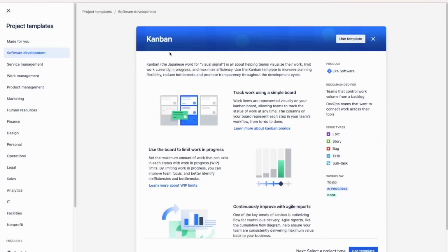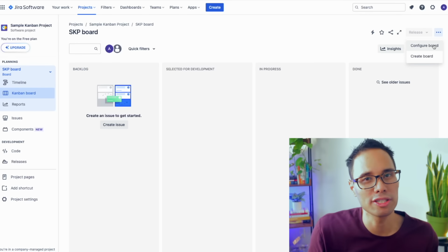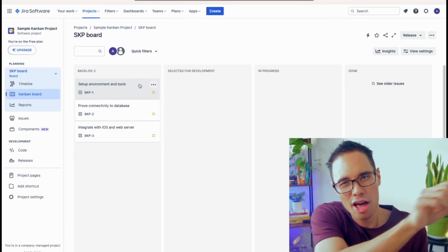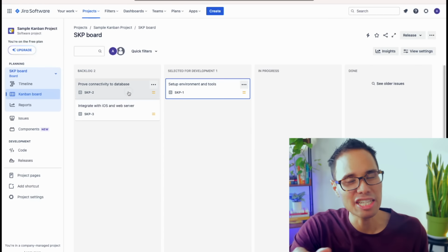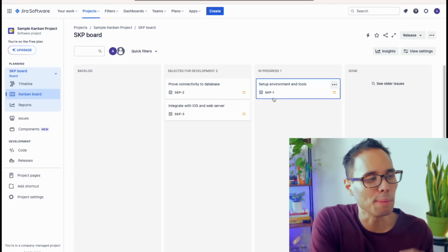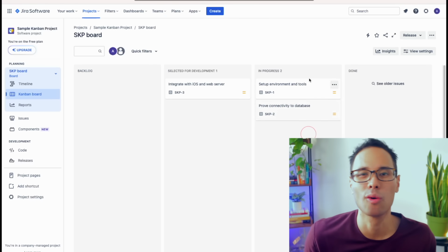Now with a Kanban workflow, you'll be using a similar board like the one I'm showing from earlier for Scrum. And your goal is to do everything you can to push all items to done. Now, instead of planning work in a time box iteration, Kanban uses what's called a pull system to move work through the process. Each time the team completes an item of work, it triggers a pull to bring in the next item that they're going to work on.